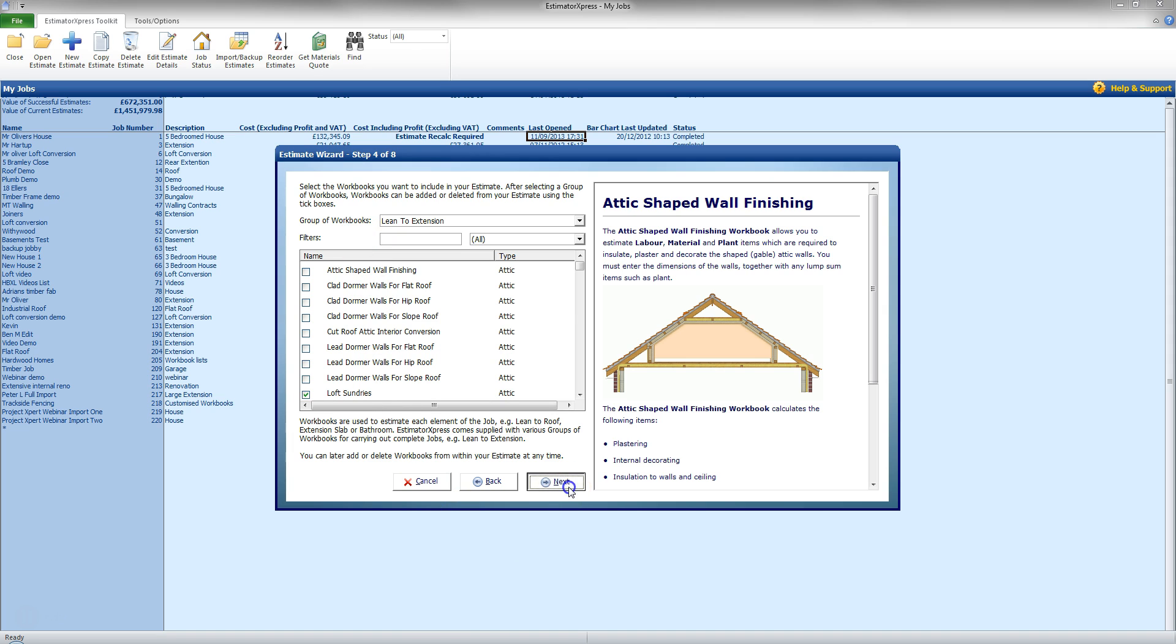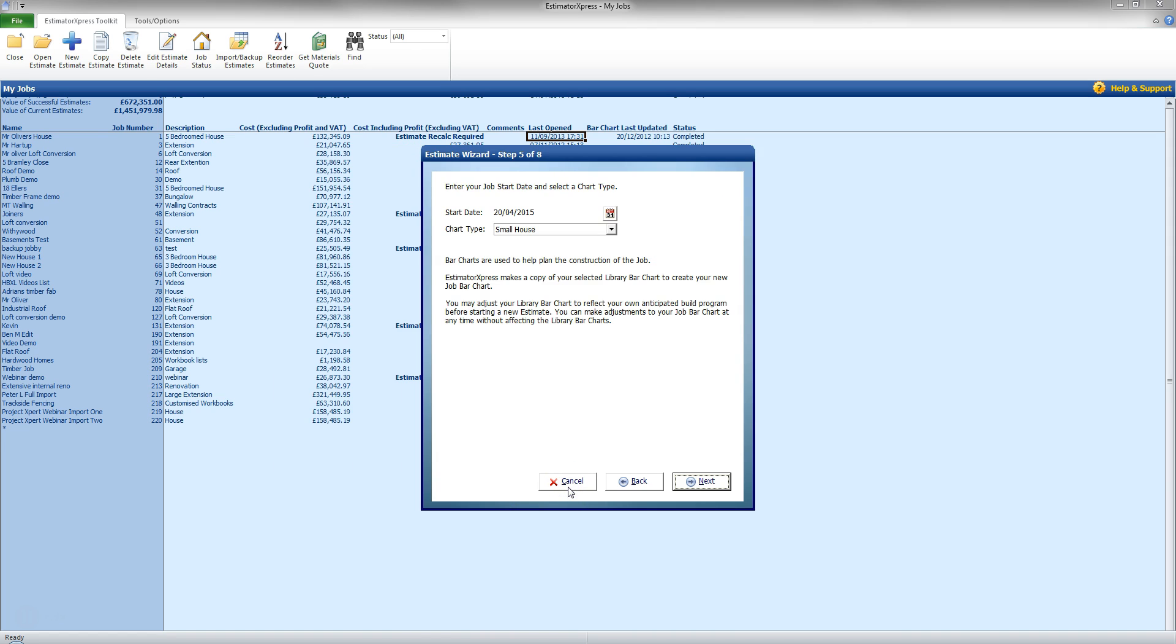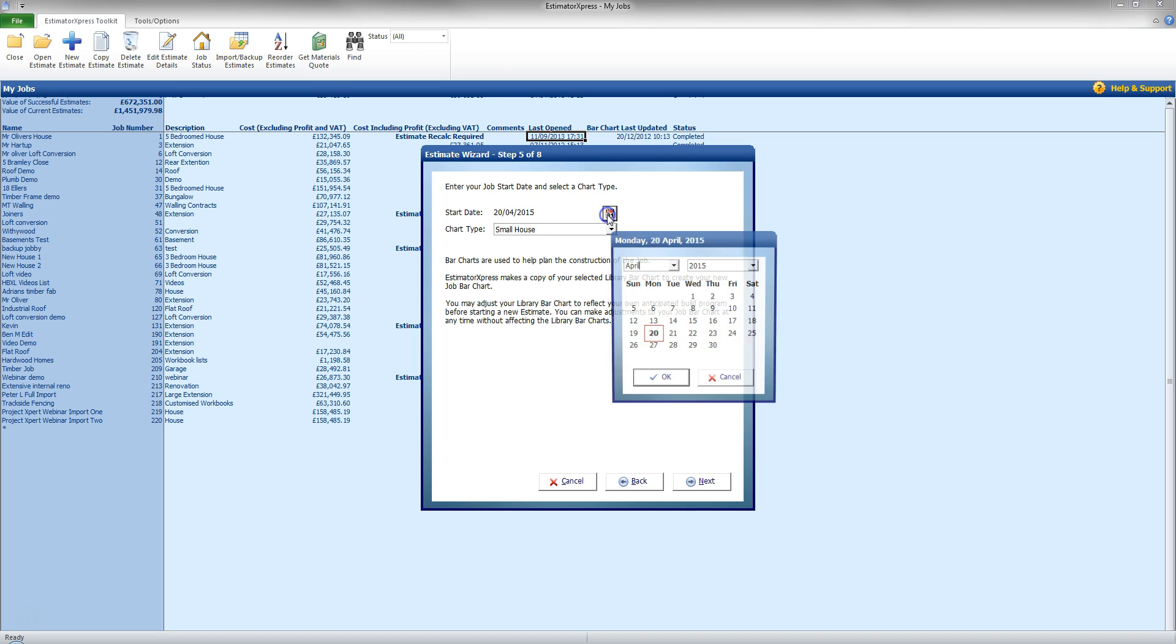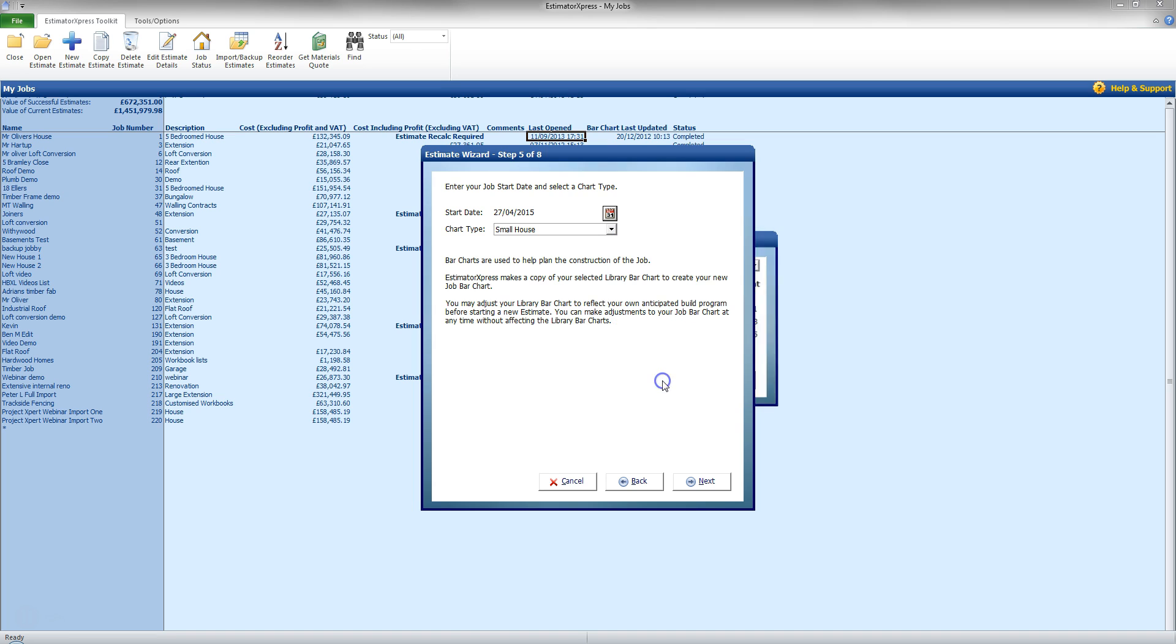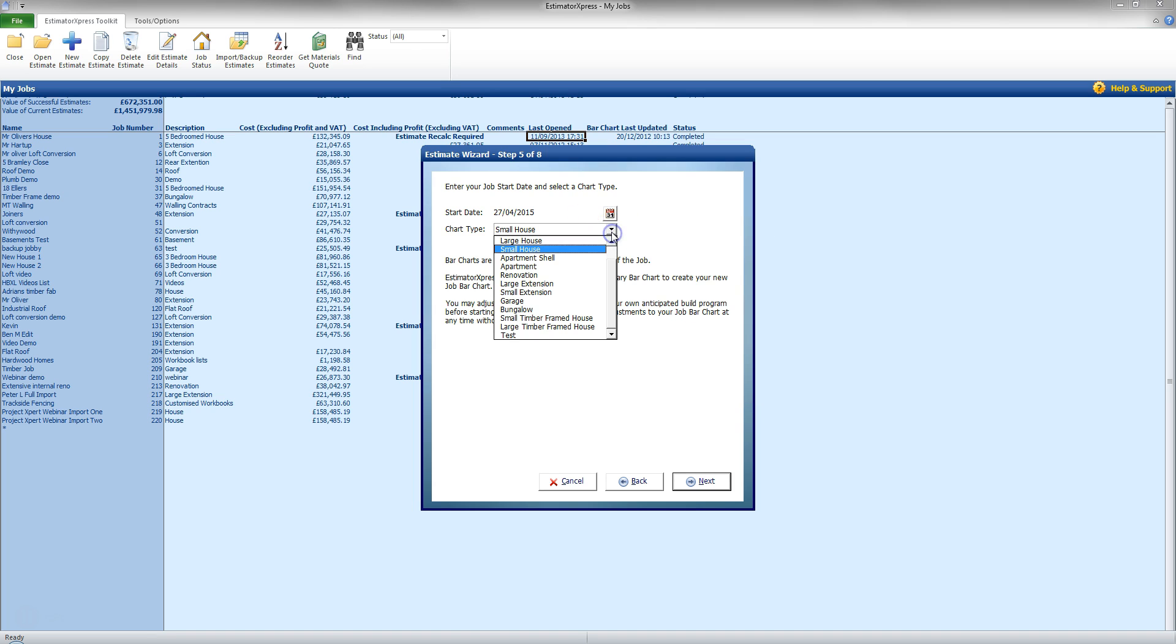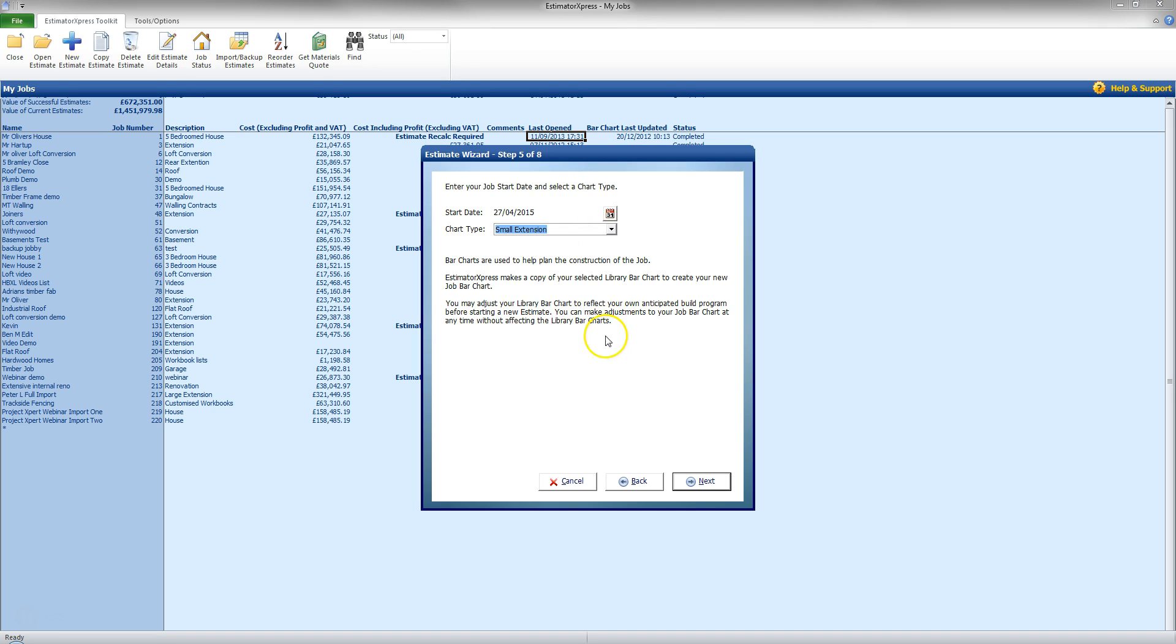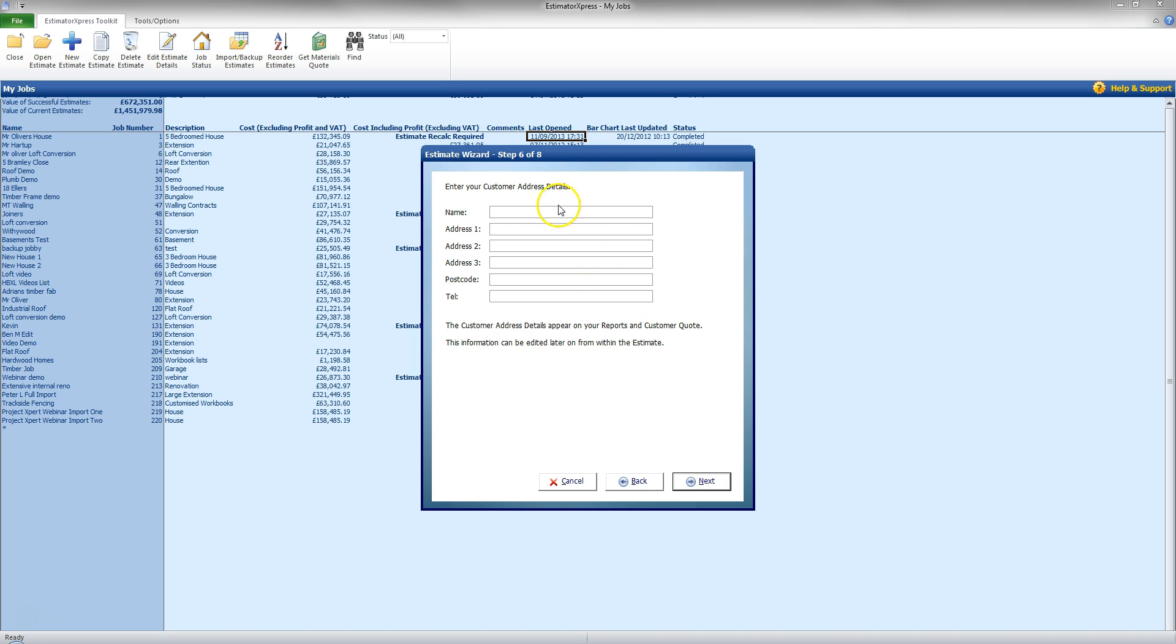At this point now I am going to click next. And it will give me options there for the start date of the job and also chart type. So I am going to set the start date of the job say 27th of April. I can always go back and change this. And also the Gantt chart to be put in for this task. So I am going to go to small extension. Click next.